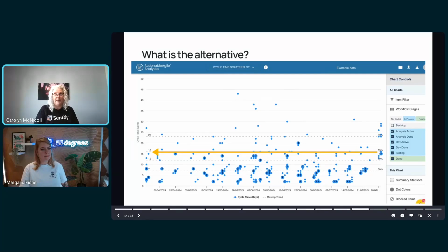And they're like, heck, we have no idea. So when we brought Actionable Agile into it and we had that conversation, they were very confident that they would be able to get it done in 8 weeks or less because of what these metrics showed them. And then I showed the Scrum Master how to watch it every day, keep an eye on the WIP age, keep an eye on making sure things don't get too old. If you get stuck, don't let it sit before you get help. And it really helped improve their process.